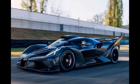Introduction to budgeting terms. Larry Jeffers Race Cars, budgeting term examples. Cash flow. Larry Jeffers Race Cars, LJRC, is building a new race car for the upcoming season. Their total project budget is $325,000. They received an initial sponsor contribution of $150,000, inflow, and have identified the following expenses. Outflow, engine, $85,000. This is a high-performance engine expected to last 3 seasons.